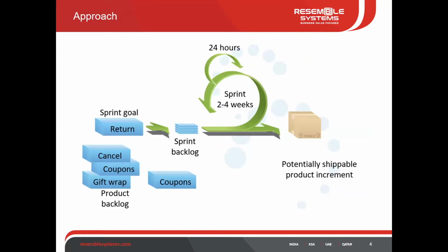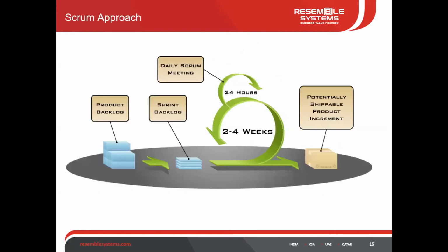So next we are talking about the application approach or the sprint approach. Okay. So as I mentioned earlier, a Scrum is executed in a sprint. A sprint is nothing but a small amount of time between 2 to 4 weeks, so that I can decide what should be my sprint time based on the complexity of the application. And what I'm going to do is, what can I deliver? Some meaningful features I can deliver within this 2 to 4 weeks time frame to the business. So that is a sprint. So if you look into this, I'll just go to the next part.